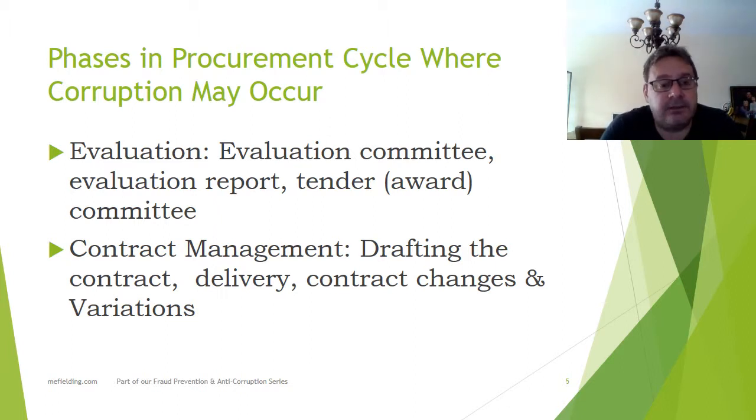The reason that this may be important is that at this stage you may now begin negotiations. So this is what you've tendered, and you're the best bid, but we actually need a little bit more of this. So we'll pay a bit more money, but we want something extra. Well, this is something we don't need, so we want to cut that out. And if we cut that out, can you make changes? This is an idea, and it's coming up under contract management as well. But this is the point where the tender does not 100% match what you need. So you've decided more or less who you want, and therefore you have to massage what they've asked you for, get it changed slightly, and there will be adjustments in the price.